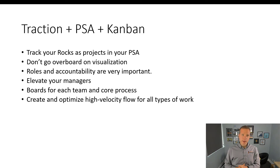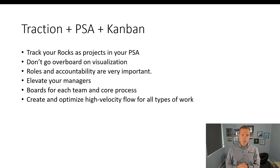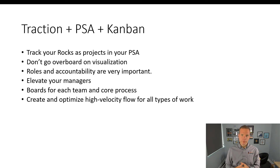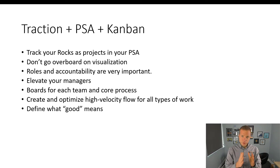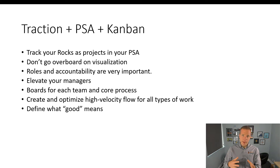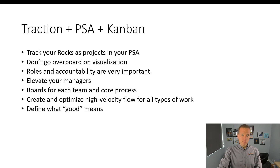Create an optimized high-velocity flow. The focus should be on not starting tickets but completing them, getting it done quickly. We do that by minimizing work in progress for each person and each team, getting them to swarm tickets and get them done, and measuring results based on what's actually completing. For each step, define how long a ticket can be there — how long in a scheduled status, how long waiting on client before it goes red because you haven't followed up. Define what neglected means and set your limits. There are a lot of options in Top Left for that.